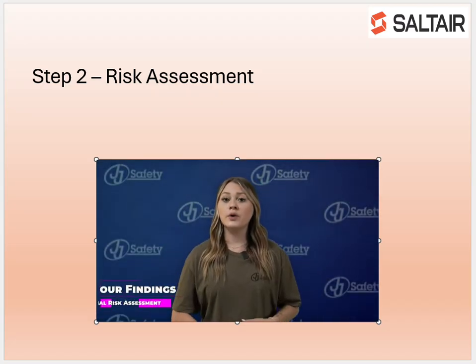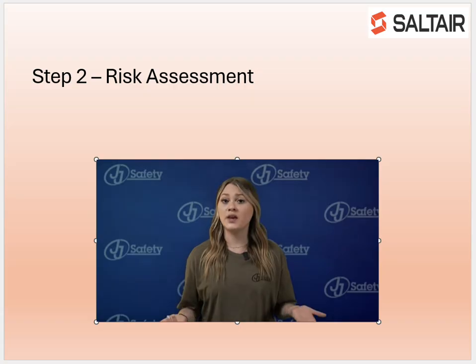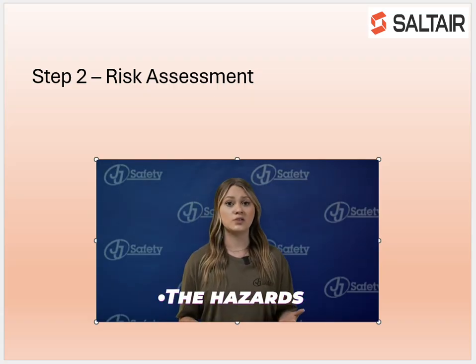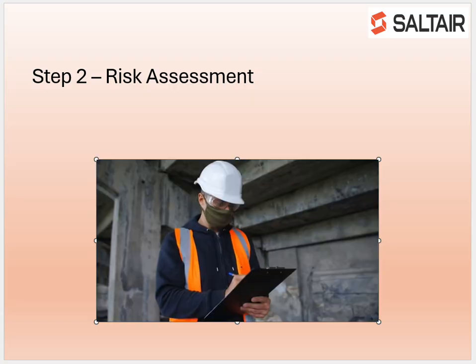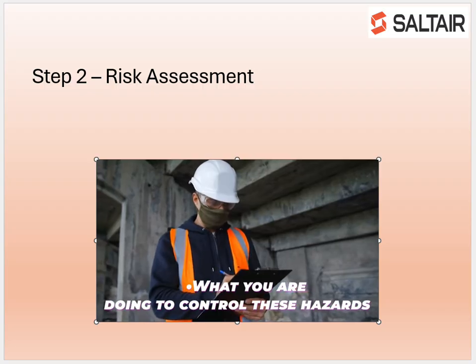Step 4. Record your findings. If you have 5 or more employees, you are required to record significant findings, including the hazards, who may be harmed and how, and what you are doing to control the hazards.